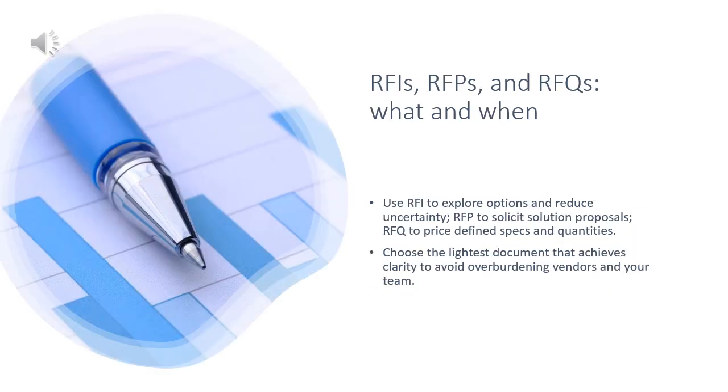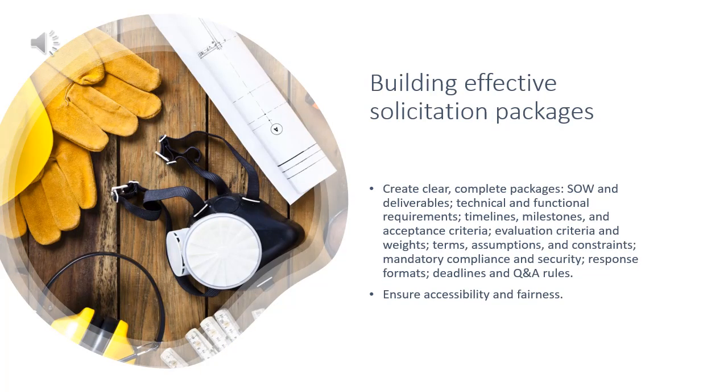Use an RFI to learn and explore options. Use an RFP when you need a solution proposal. Use an RFQ when you know exact quantities and specs. RFIs reduce uncertainty before committing effort. RFPs compare approaches, teams, and methodologies. RFQs compare price for defined goods or services. Choose the lightest document that achieves clarity. Avoid overburdening vendors and your team. Well-written packages speed evaluation and reduce disputes.